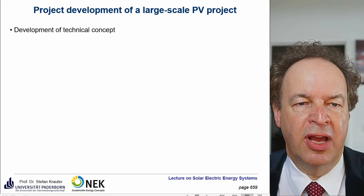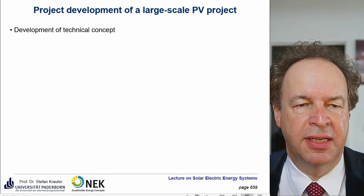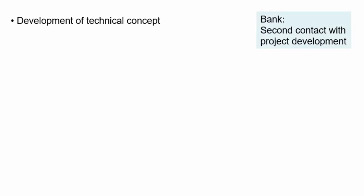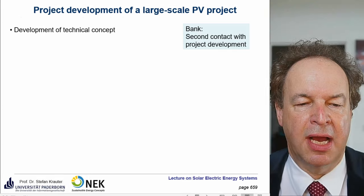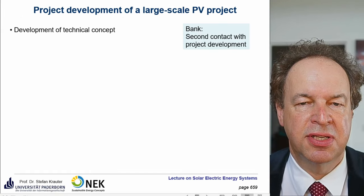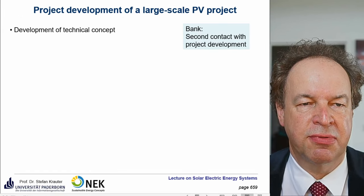Then you develop the technical concept and have a second contact with the project development. Some banks have good and bad experience with certain brands of modules, and this has an impact on the interest rate. The lower the risk involved, the lower the interest rate. If it's a new kind of technology, the risk is higher and you have to pay more interest.